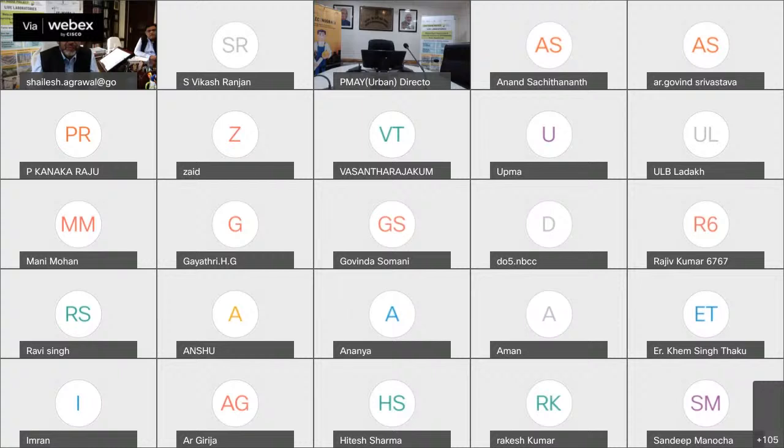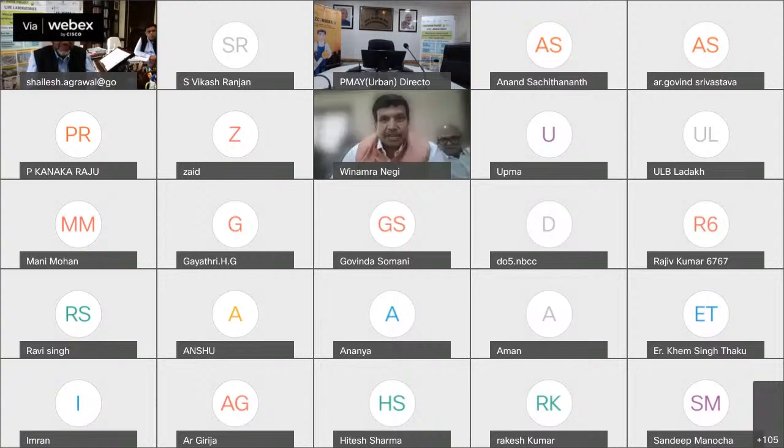Scale of project, I think, for adoption of this monolithic construction, sir, I think he has said that 100 to 150 repetitions means almost you are evening out. 200 to 300 in steel, yes, even 500, companies are claiming. Jignashu, you tell him. Yes, sir, you can use 1,000 repetitions. Just to give you an idea.